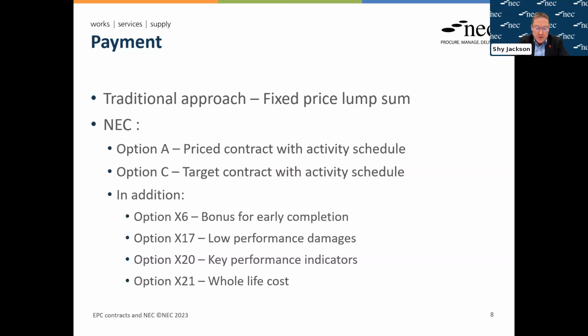And then the final one that I wanted to talk about is option X21, whole life costing. And this is about proposals which are being made at the construction stage that will reduce the cost of operating and maintaining an asset. And when you think about it, when you're looking at an EPC contract, which quite often will be then operated over at least 25 to 30 years, you can see that quite often a small investment during the construction stage can result in very substantial savings over the full contract period and will improve commercial performance, which will improve revenue being received.